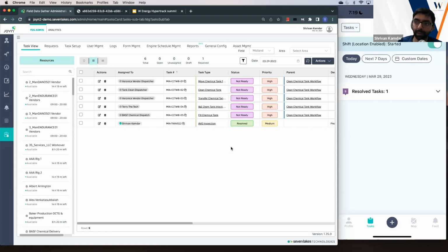Like, given I'm a field user, when I click this button, then this should happen. Okay, well, Muju can give it back to me a week later and it happens, but maybe it took 5 minutes because I didn't say it has to happen in 3 seconds. So a lot of those things need to be considered upfront. A lot of times features are easily designed without the performance criteria that are required for them. And you get something that works, but it doesn't work for the context in which it needs to be delivered.